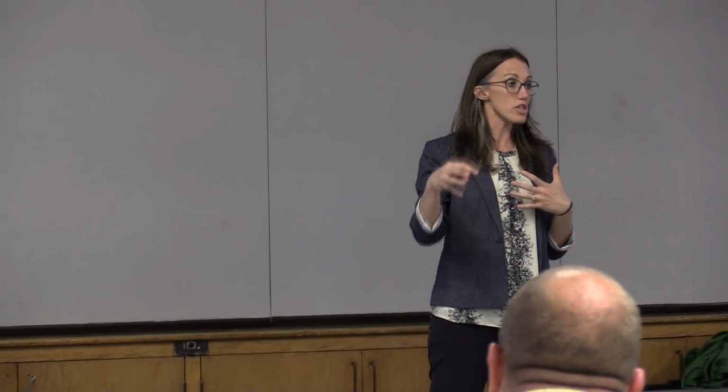We're looking at the site, how the existing site works with the existing building, how that might be impacted by a renovation addition, and we're also looking at maybe what does a new school look like. These are the things that we're weighing right now, the pros and cons of those. We'll start to get into concept alternatives, and what that means is we look at different options for the layout of the renovation addition or the new school, and how those programs work together. And then once we have those, we give them to the construction manager as well as our in-house cost estimator to find out how much those options would cost. All of that is what we call the study. So that's what we're actively working on right now, and that should be completed by the end of this summer.